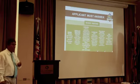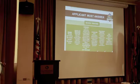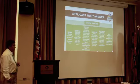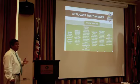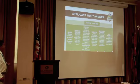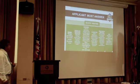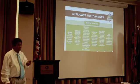And this is what we're asking and looking at in your submittals. Under the Safe Drinking Water Act, this is what we're looking at. We have a guideline for waterworks development, which we give to the military, and mostly the engineers should have that. Under the Safe Drinking Water Act UIC and Wetland Protection Program, the questions are: does the drainage system have a UIC? Or is the project within the 1,000 feet radius of an existing production well?